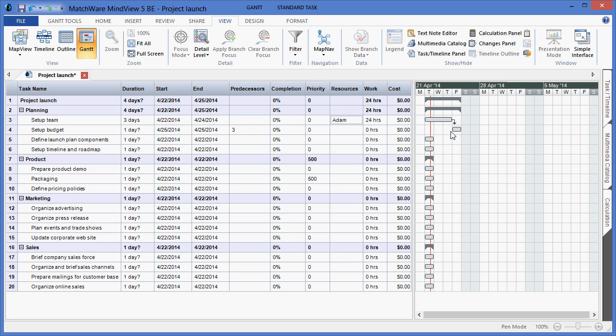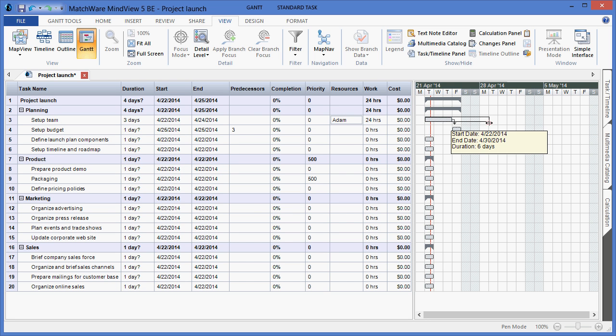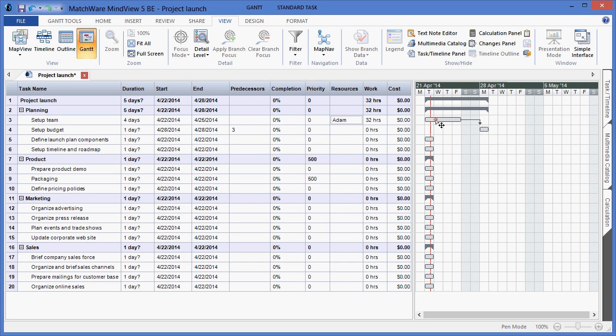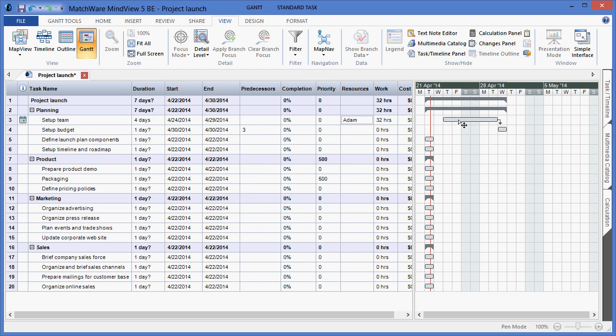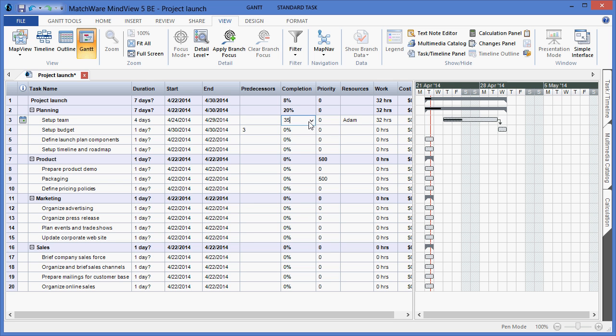I also have the ability to work directly in the duration bars. By left-clicking and dragging the duration bar to the right or to the left will extend or decrease durations. I can left-click the bar to alter start dates. And by hovering the left side of the duration bar, I can choose to increase or decrease completion levels. I can also choose to update completion levels by left-clicking in the completion field and utilizing the drop-down list.